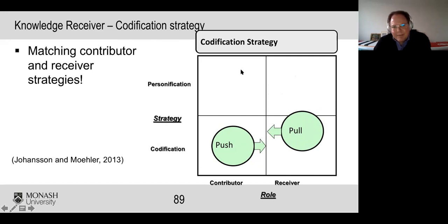So the idea is, if there's a learner, to make it part of the process that they get the right documents, with relevant information categorized towards their needs. So this is actually not pushing, it's pulling, to push the learner, if you want, so that they are actually looking for the right information, and we can initiate this in a process before they start a project. You have a kind of personification, and they explain how to use the database, and they meet the right people. So we actually did both, of course, because Volvo is pretty good in this.